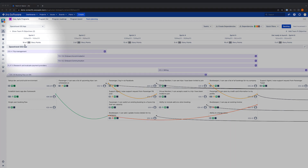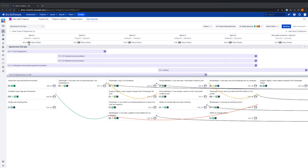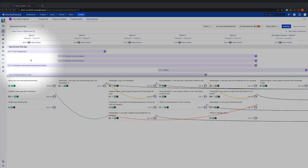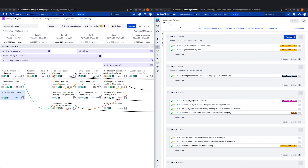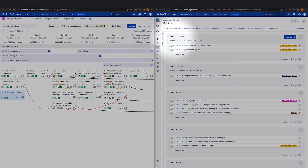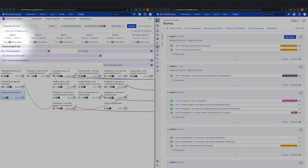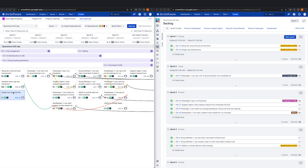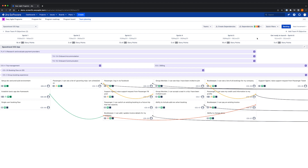Beneath these are estimations and team capacity, which indicate the capacity versus the estimated work to see if the team has over committed for that given sprint. At the top of the team planning board, we can see features that are shared with other teams or specific to this particular team. Beneath these, we've got the issues scheduled to deliver against those features. This team represents an agile board in JIRA. The issues scheduled into sprints in Easy Agile Programs are scheduled into sprints on the agile board in JIRA, meaning there is no need to double handle because everything that you see in Easy Agile Programs is reflected on the JIRA backlog in real time. By having a dedicated space for their own planning, teams have a single source of truth to understand and manage the sequencing of the work needed to deliver a feature across the increment.